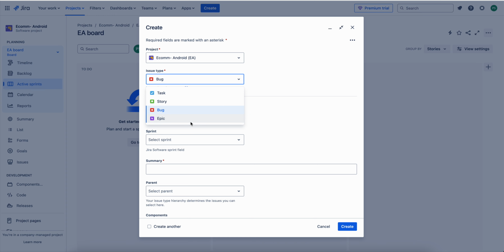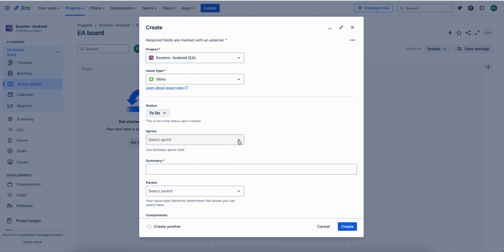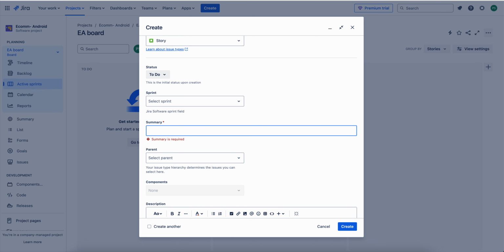So who will create the epic? Epic can be given by the business to the product team, so that epics can be created. Then from those epics, the product team will create the user stories. Generally user stories are the decomposition of the epics. It can be a smaller breakdown of the epics, which is easily transformed into test cases. So it should be a very minute, granular level of the epic.